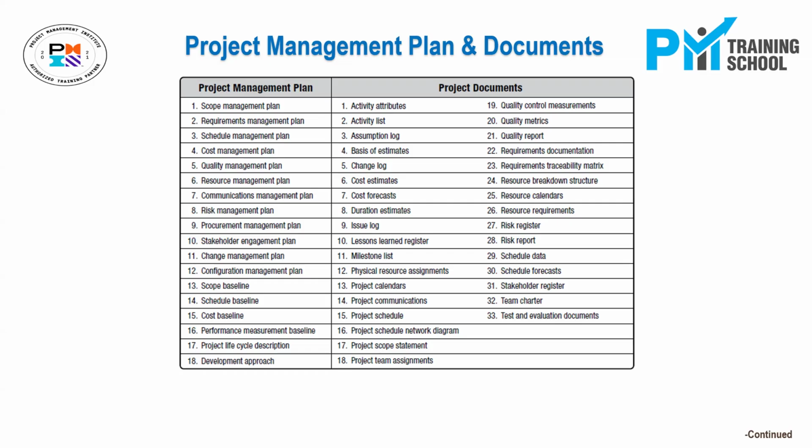Could you give me an example, please? For example, you prepare a business case for the first time in a draft format, right? And when you get satisfied, you convert it into a final version. You present it to your boss and he approves it. Later on, the business case gets amended somewhere, and there is yet another version coming up. But you keep all the older versions on record. That is called configuration management. Okay, clear. So this is also an optional plan, but a very important plan. If you understand the concept of configuration management, you would probably love to have this, which will help you trace everything.